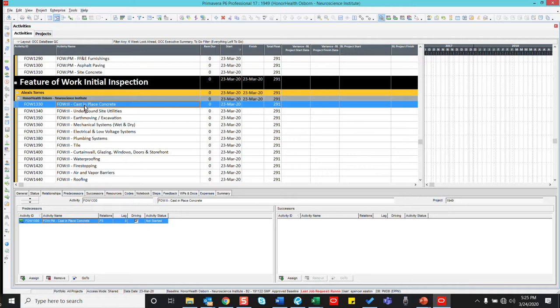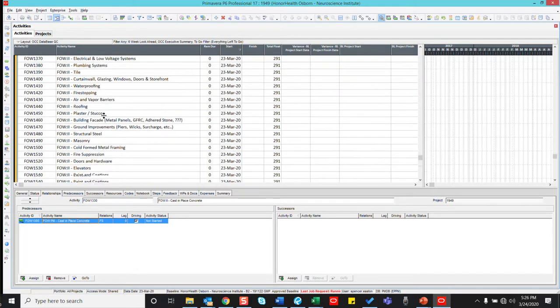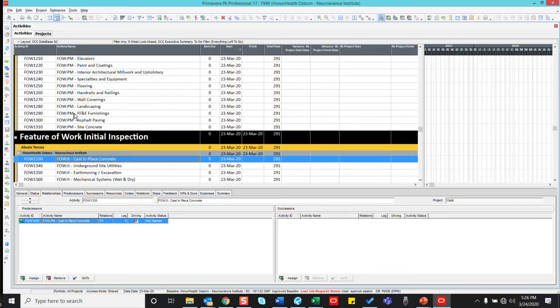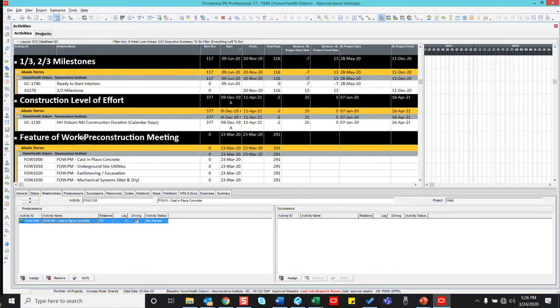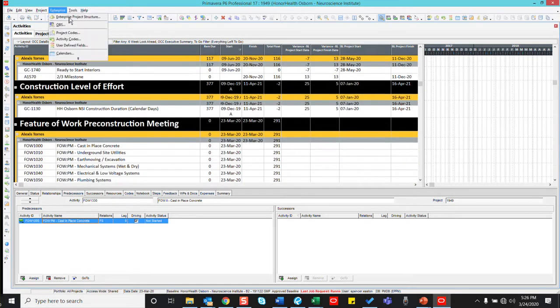It should be linked that way. Thus, it should link off of the first install activity and then link to any subsequent activities that need to happen. So that should be the tie. This should be relatively critical if it is on the critical path, or relatively the same amount of float for whatever flow path that's on. So that's those two and how those are linked and how those are used.